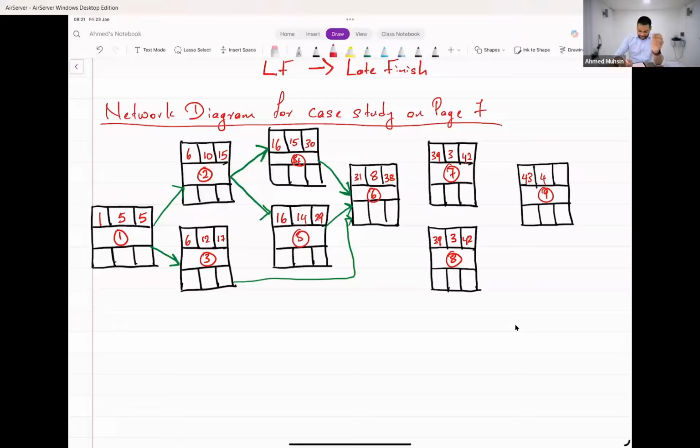Couple of mistakes, boys. 39, 40, 41. It shouldn't be 42, it should be 41. The earliest this can start is 42, 42, 43, 44, 45. Running out of space. 45, isn't it? This can finish on day 45. Earliest it can finish. Are we okay with this?